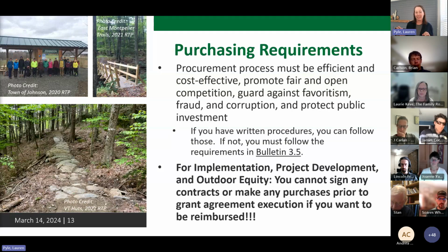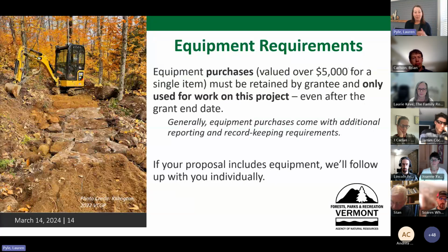This is the purchasing piece: you have to wait until your grant agreement is executed to sign the contracts or make the purchases. So just know that it does say that in the Attachment A's, that you've got to wait. There's also a piece in there if your proposal included equipment.